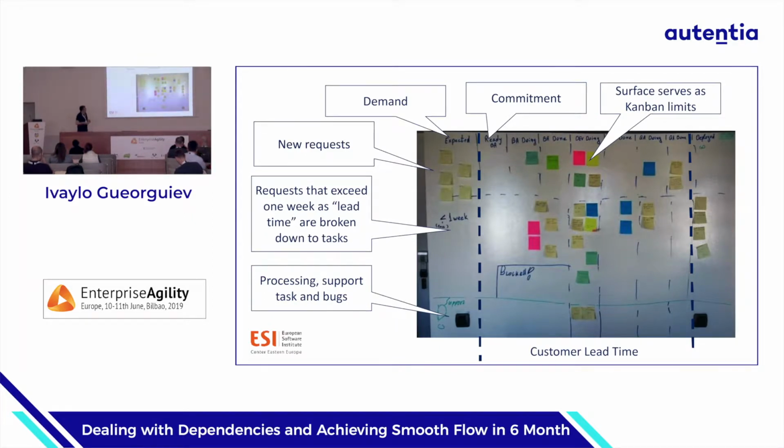So what we have is demand, and there was a commitment point. They agreed with the client. If they put it in BA ready, they start working on it. And the policy was to produce it in 2 weeks.